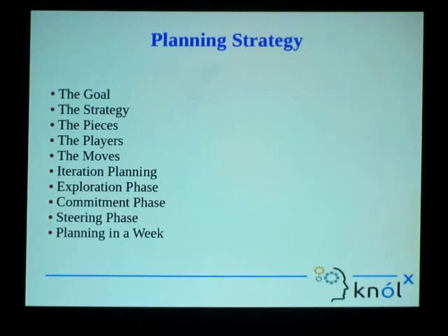So we will not be able to deliver these tasks which are of less priority, because these come after this particular feature 1 or 2 or 3. So it all depends on the priority of the ticket. Exactly. They should always be arranged in priority. And if the client is not doing it, just ask them what their priority is for this. So clients cannot change the priority of the ticket within this? They can change it.